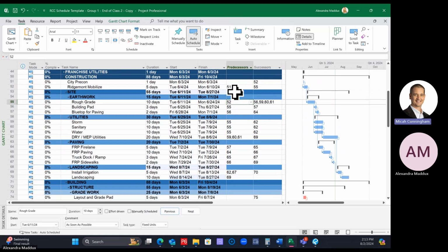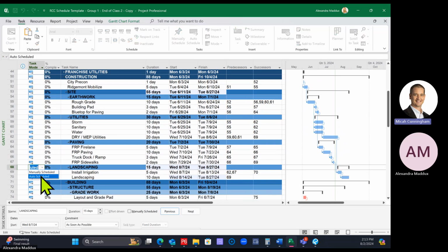To delete it, you can just click on the cell and then hit your delete key. So change that. Click on the drop down where the pin is and change it to auto. If you type a duration into a summary, it'll make it a push pin.